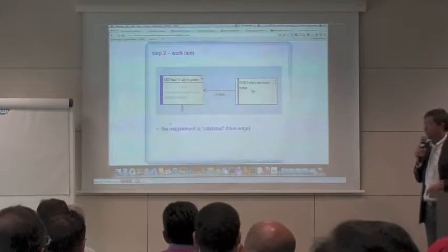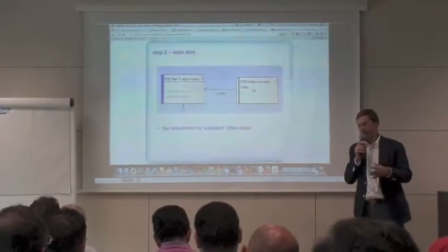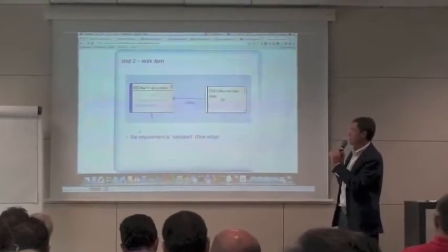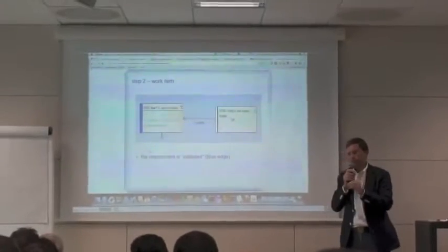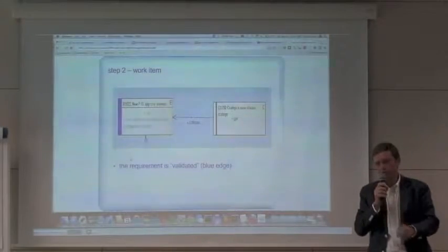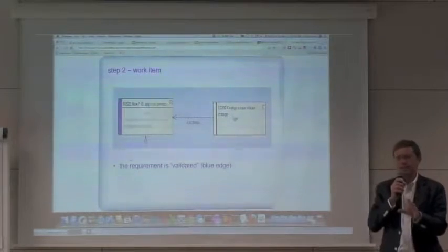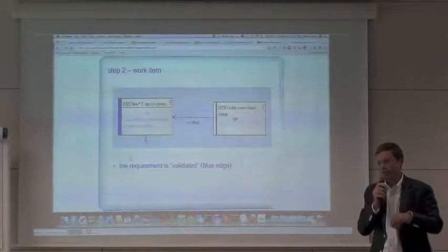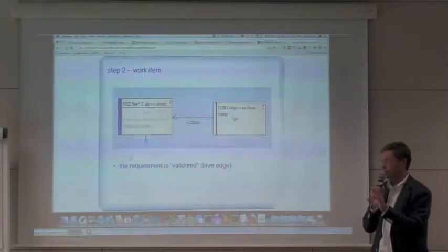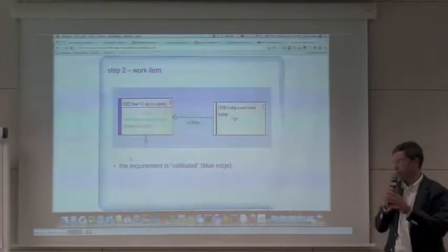Okay. When we have finished with requirements, we carry on an analysis in several ways, and we identify some work items. Work items are the typical work breakdown structure of the project, and each work item is usually a single activity or a number of things to develop that have a very identified scope and are quite connected.